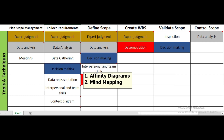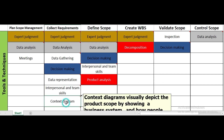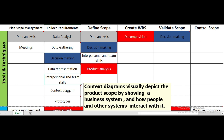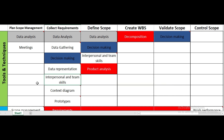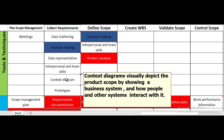For data representation in collect requirements, we can use affinity diagrams and mind mapping. Interpersonal and team skills include nominal group techniques, observation, conversations, and facilitation. Another tool is the context diagram, which is a visual depiction showing how different components of a business system and product scope interact with each other. Prototypes are also used to obtain early feedback related to scope.